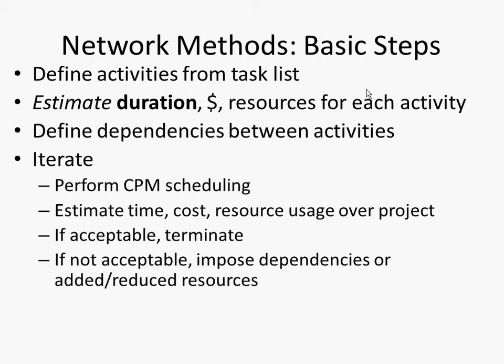We have to finish the setup of the test machine before we can run test cases on it. The web server has got to be set up before we can do a deployment to it. The DMZ has to be set up before we can allow our external clients to do an acceptance test on the system on the web server. These are all examples of finish to start. You've got to finish A before B can start. Does that make sense? Okay.